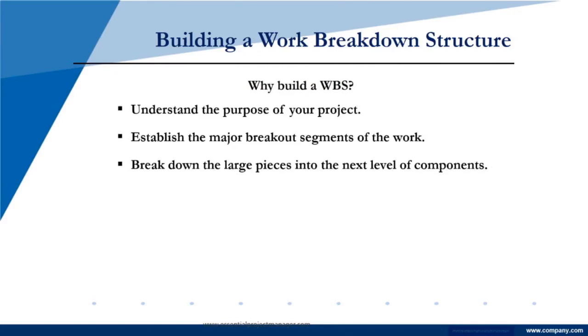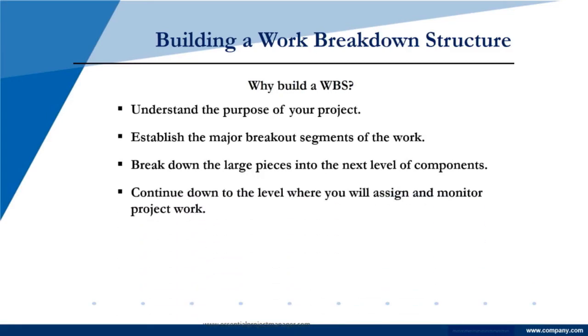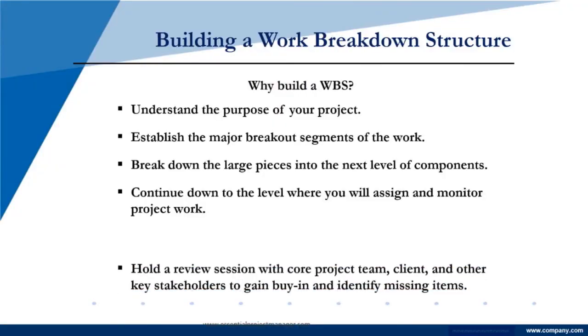So we break the large pieces into the next level of components. Continue to the level where you will assign and monitor the work. So you are planning to assign the work. Somebody's going to do it. And you want this to be created in such a way so you can easily go, Joe's going to do this, Jack's going to do that. Oh, and there's too much work here, which we'll get to when we talk about resource allocation, if that happens.